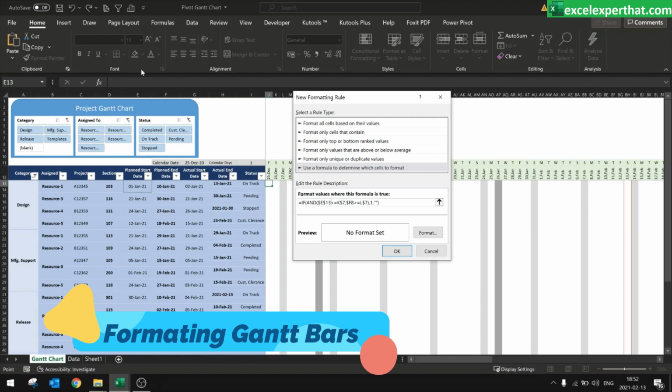Remember, we need to change the rows, sorry, so I'm going to fix the column and compare this with the start date, where I also need to fix the row and not the column. Then I'll put the plan end date, where I also need to fix the column and not rows, and I'll put the very next day here, where I again need to fix the rows and not columns. If the condition is true, it will show 1, else nothing.